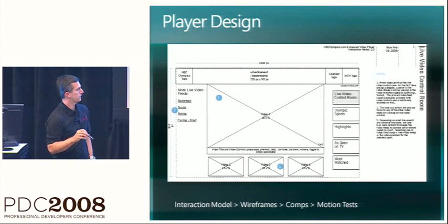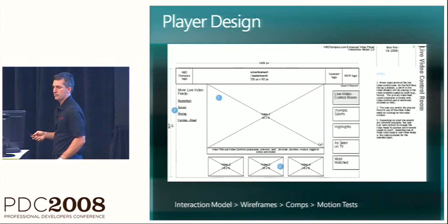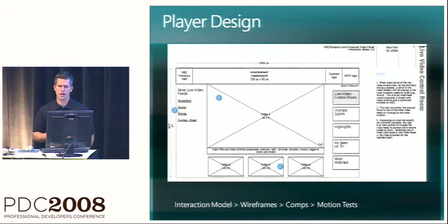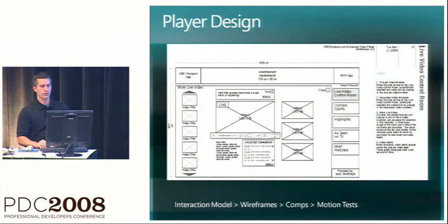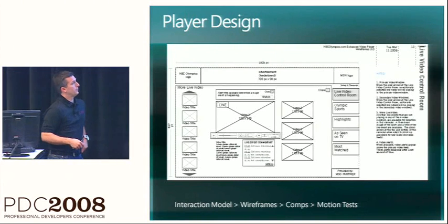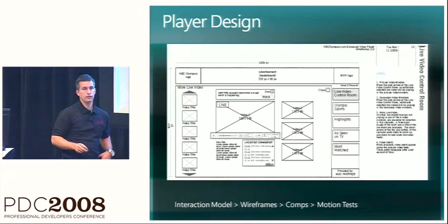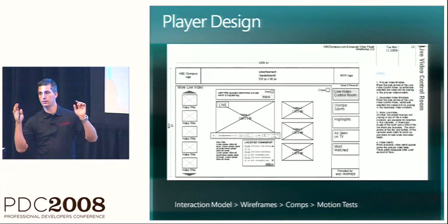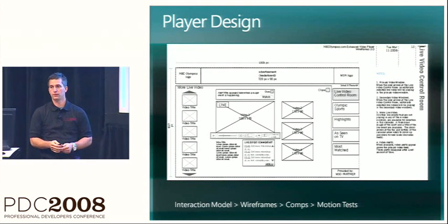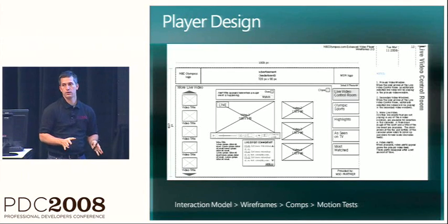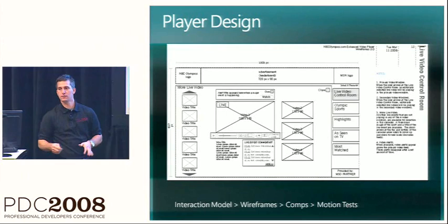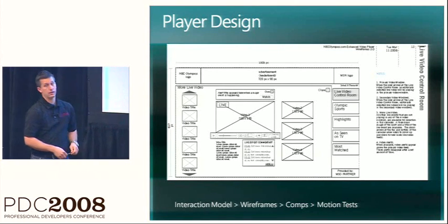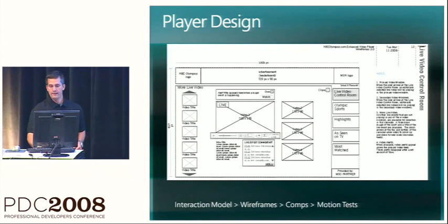We did start with classic wireframes, basically passing PDFs around. This was a shot from about February, I believe. We did all of our user interaction inline on these pages. If things changed in meetings, these documents were updated. They became the de facto point of what and why and how the application behaves. There was no, oh, hey, Bob in that email said he wanted to change something. No, it all got codified back into our wireframes.